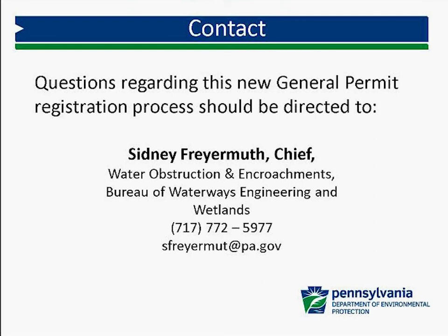Hopefully, if you submit a complete package, you will receive your authorization within 60 calendar days. It doesn't necessarily mean it's denied within 60 days. It all depends on whether, through that review, it's determined that there is a deficiency or whether or not it's even eligible for coverage.